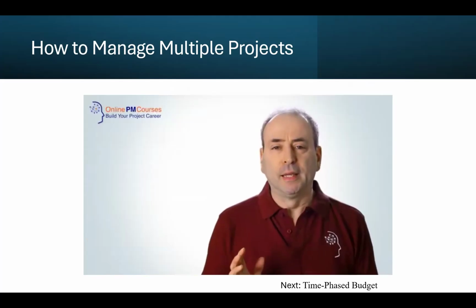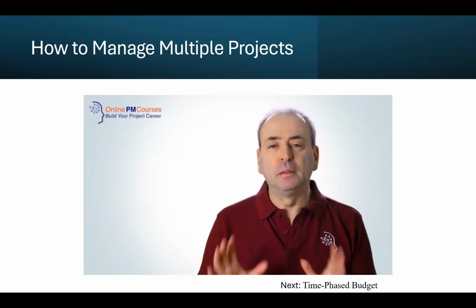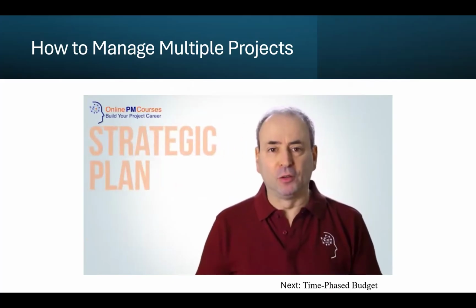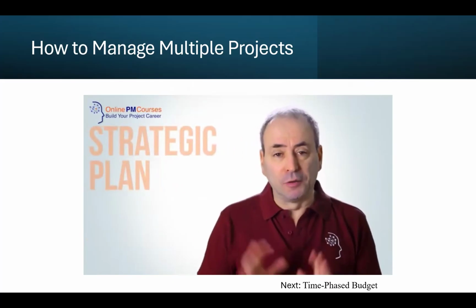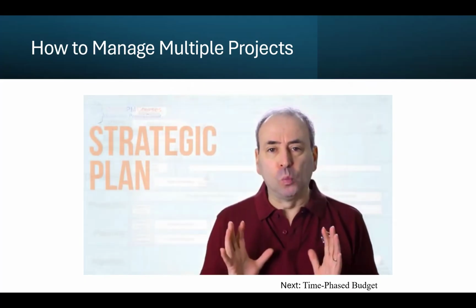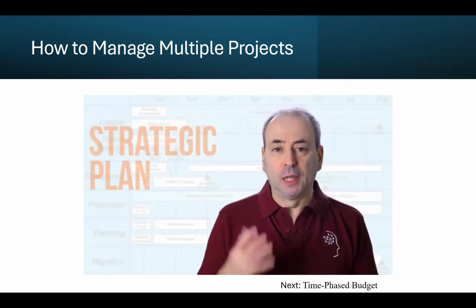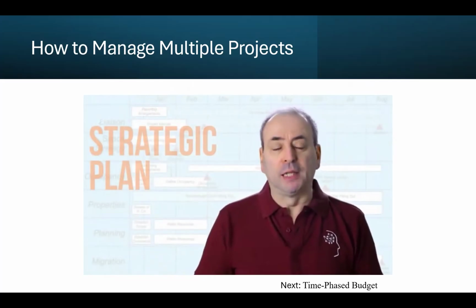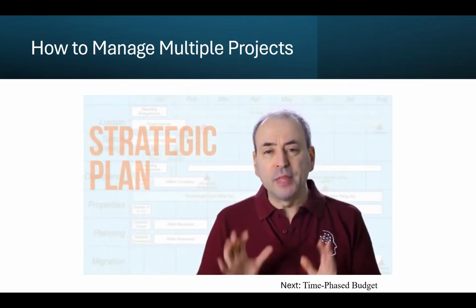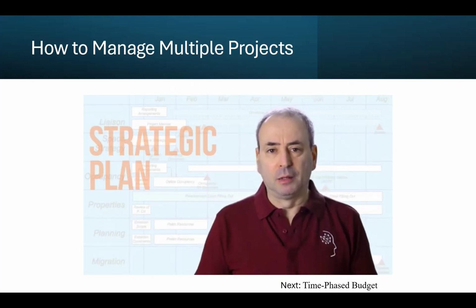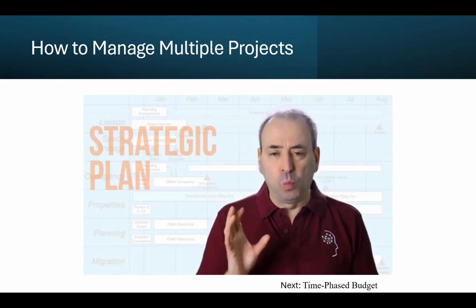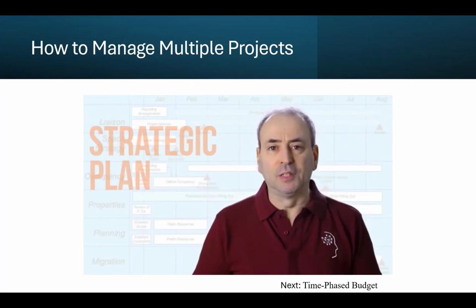My fourth idea is right at the outset, build a strategic plan for everything you're handling, all the projects you're involved with. Put them onto one chart, represent projects or major work streams as bars on that chart and see how they interact, and then shift the timing of activities, work streams, and in particular of deliverables and milestones on individual projects so that you don't get crowding.